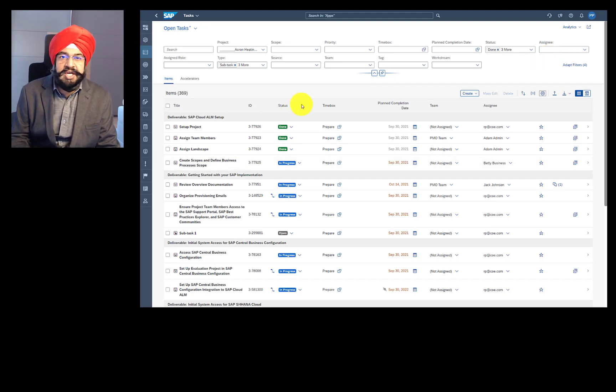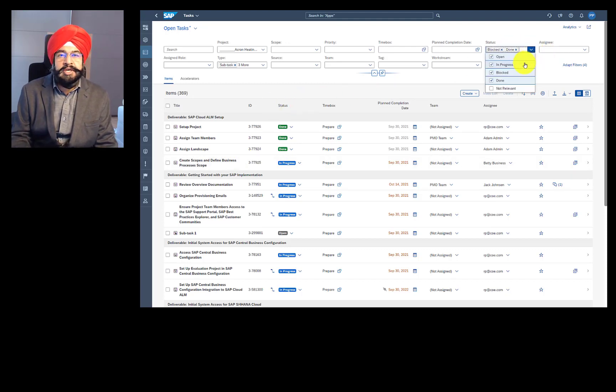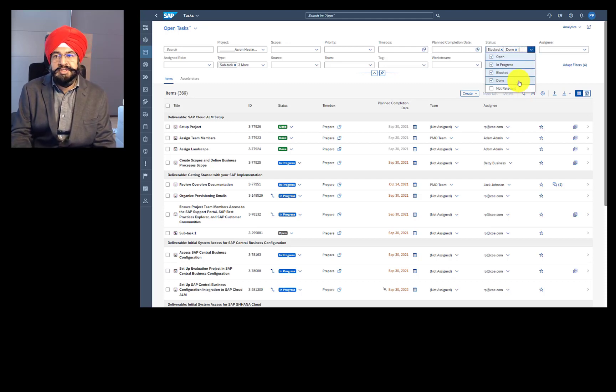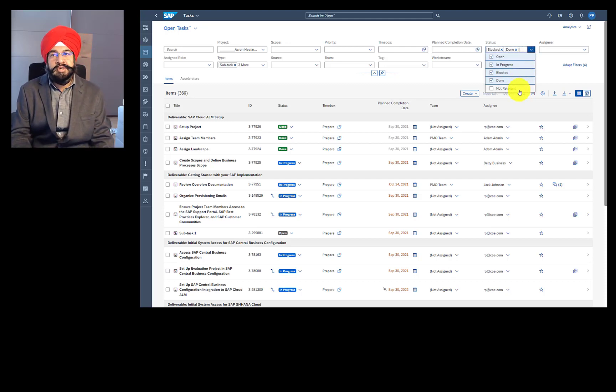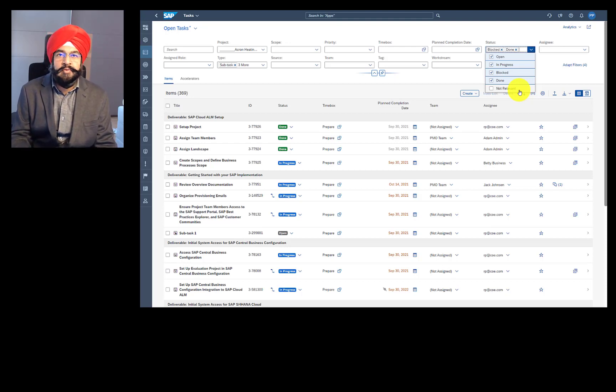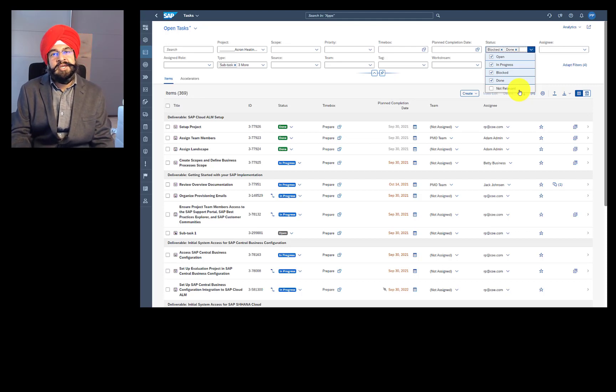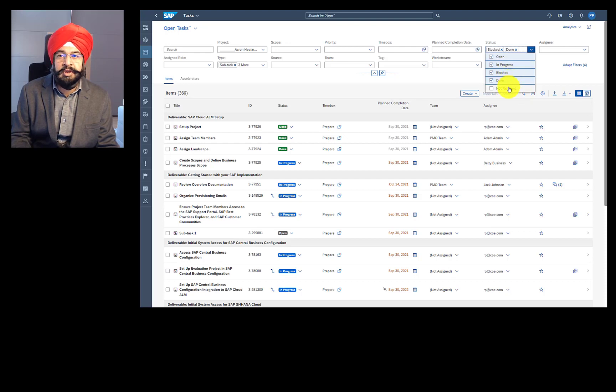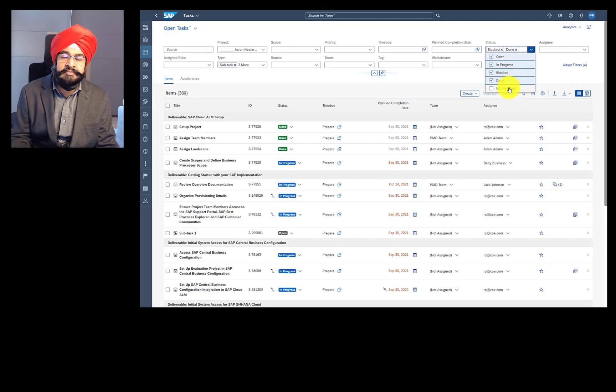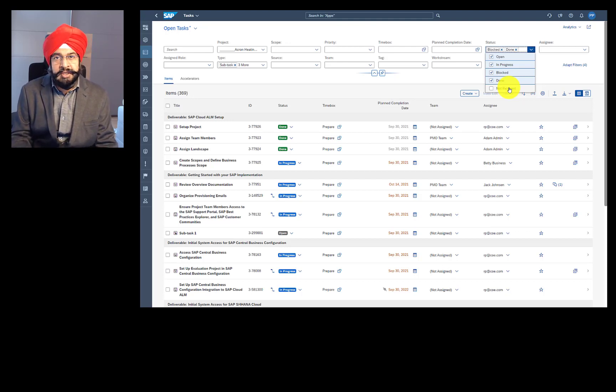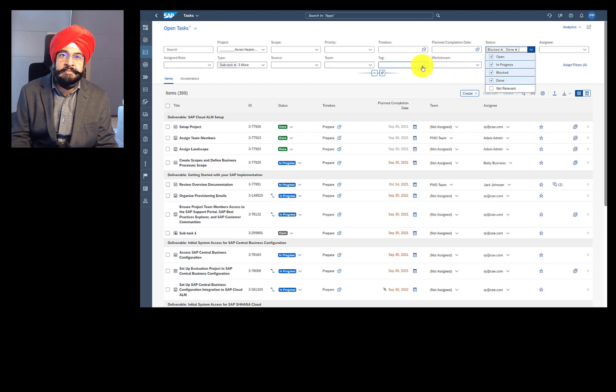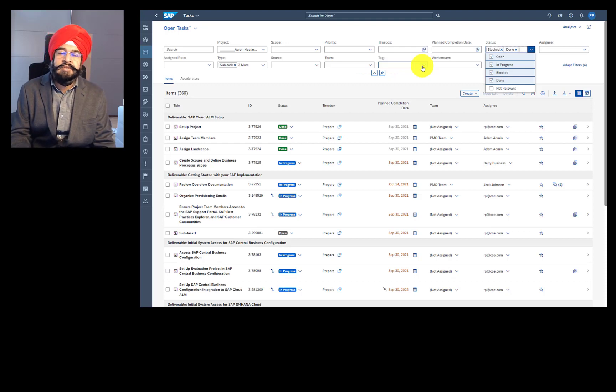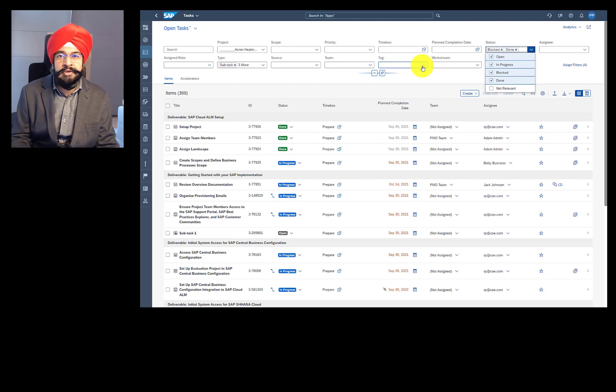Now let's talk about task status. We allow only these status to be used. Open, in progress, block, done, or not relevant. We do not allow this status list to be increased. Why? Because we have some analytic reports which come pre-delivered and pre-configured. And keeping the status list small makes it easy to manage that. If you need custom statuses, let's say you have a status called deprecated, then what we recommend is you use tags for that purpose. You can create your custom tags easily via Excel upload. And that way you can manage your own custom workflow using the tag filters.